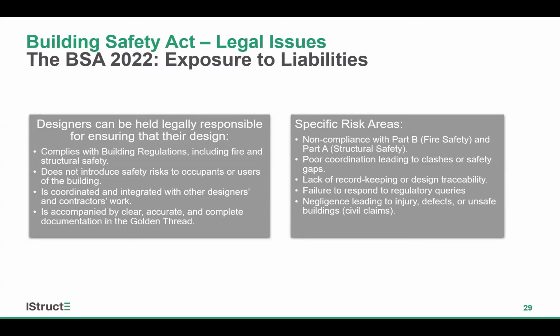with each other properly. Because of the requirement to keep accurate records, the lack of any record keeping or traceability creates a significant risk. And that's not only in relation to the golden thread, but also in relation to keeping and preserving evidence of coordination and occurrence reporting. So there's going to be a real need for increased focus for everyone on record keeping, proper revision control of designs and so on.